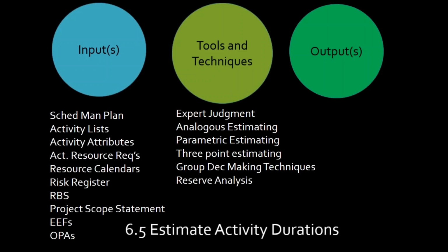That I actually need to go back to my sponsor and say, hey, I need more money, I need more people, and none of it's in my budget right now. So I got to ask for it. Contingency reserves I can apply. Management reserves I got to ask for.